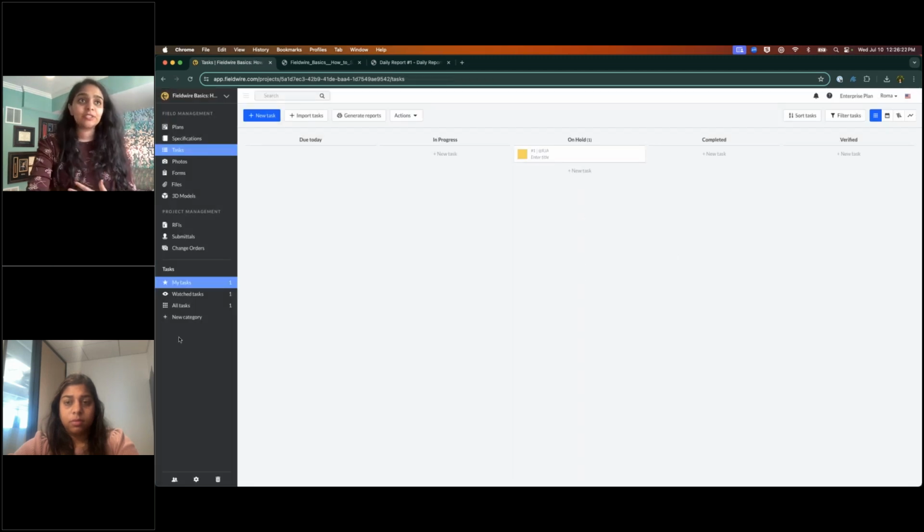The next thing is categories. So categories are how tasks are grouped. For general contractors, I recommend either trade, the specific subcontractor themselves. For subs, the world is your oyster. So let's stick with that electrical example. For example, if you have just one scope of work, but you need to put in a lot of fixtures, each of your categories could be the different fixtures that you're putting in, and then that way you have your terminated, pulled, et cetera, et cetera.